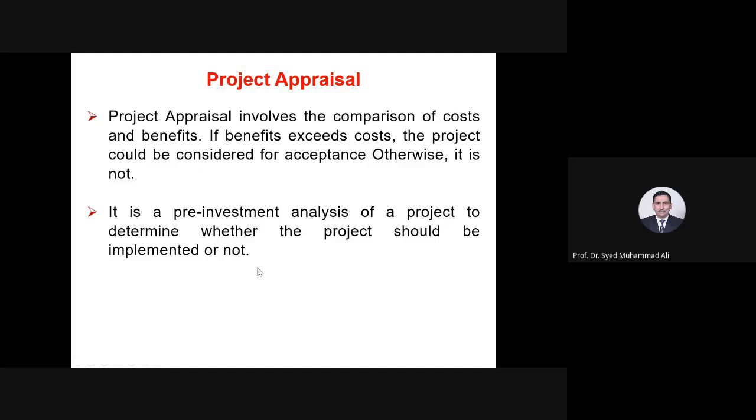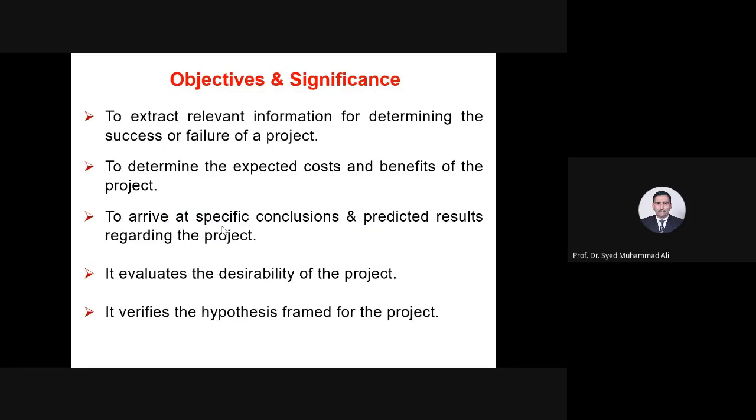Okay, project appraisal involves comparison of cost and benefits. If benefits exceed cost, the project could be considered. Again, I have mentioned it is pre-investment analysis of a project to determine whether a project should be implemented or not. So before you invest, before you give the money, before you spend the money, you do the analysis of how feasible it is or not. To extract relevant information for determining the success or failure of a project, to determine expected cost and benefits, to arrive at specific conclusions. It evaluates the desirability, it verifies the hypothesis.